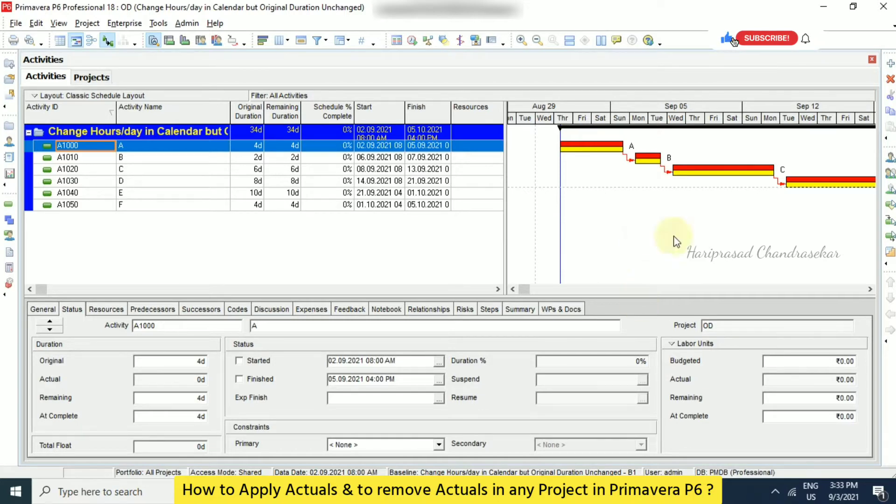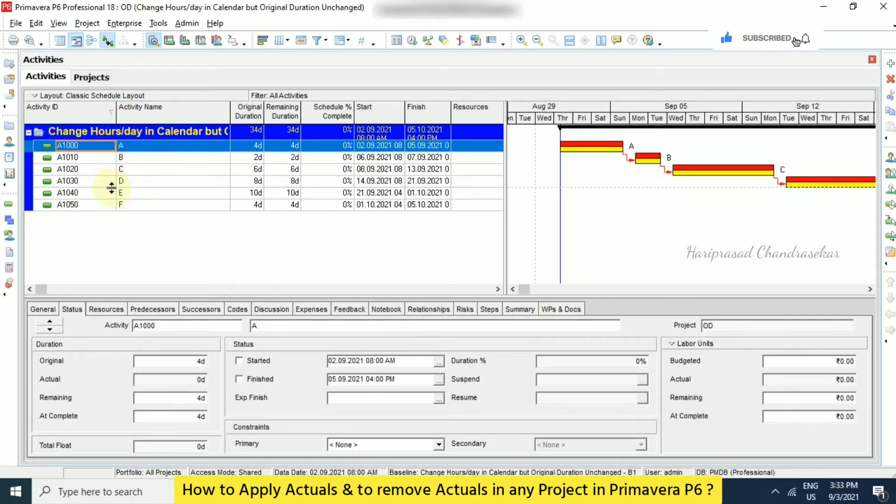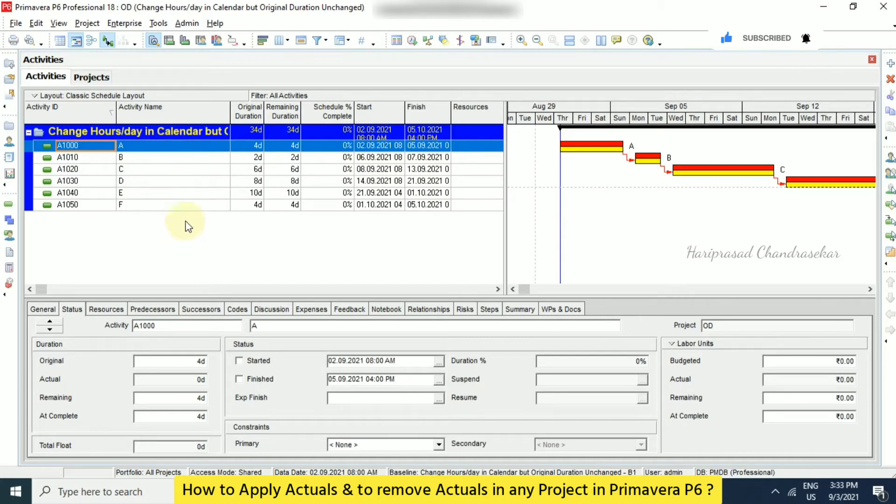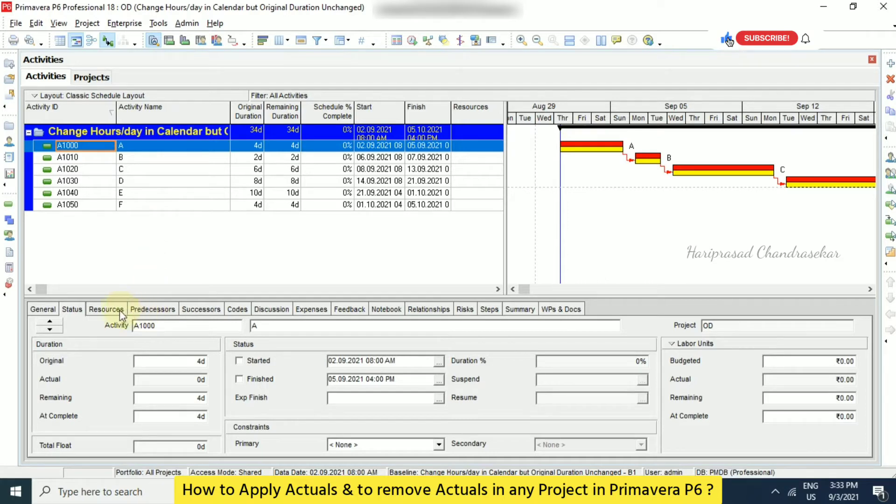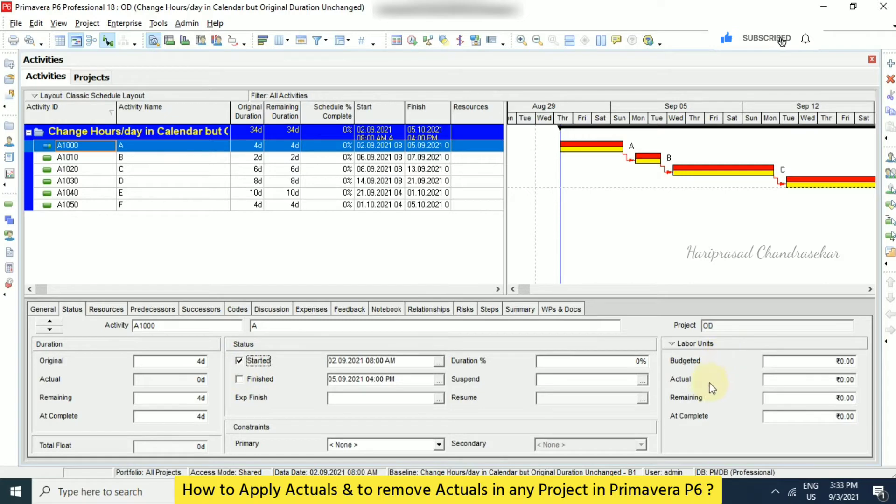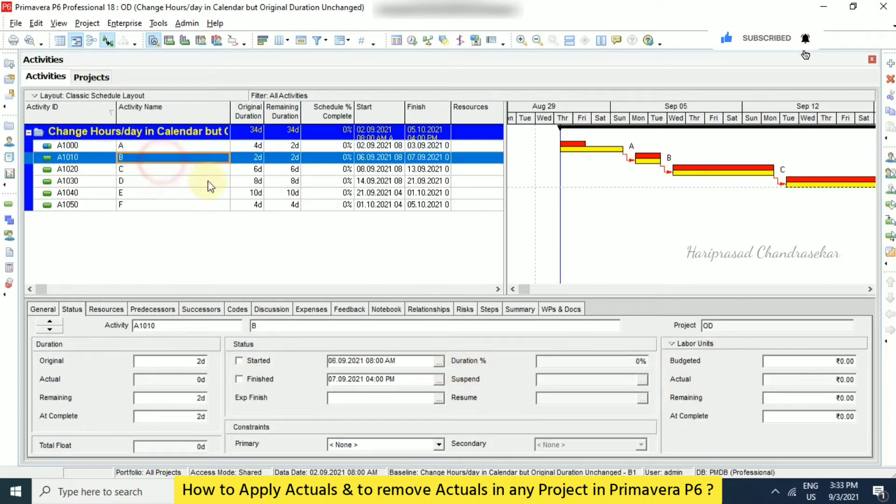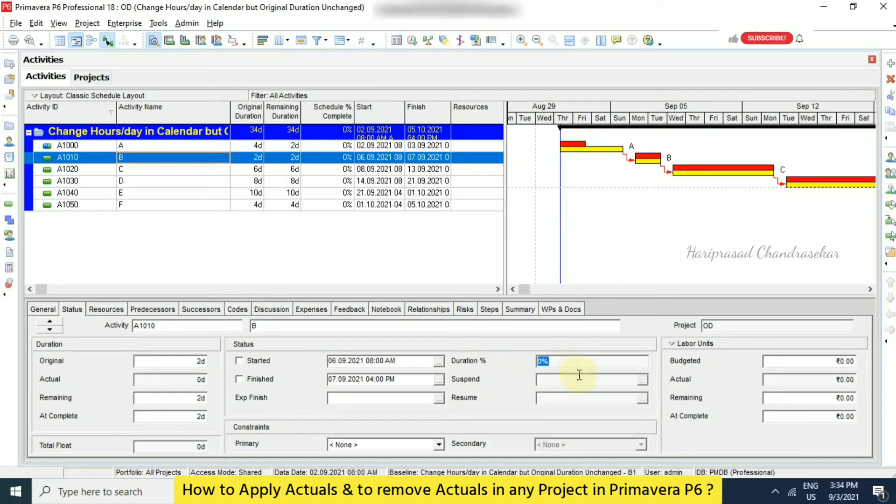In this case, I am just considering the same project that we used before for changing hours per day in calendar. I am just going to update something. We can just go here in the status tab and we can put starter and you can put some percentage. So 50 percentage. See, you can't enter anything. Only you need to select starter and then you can enter.